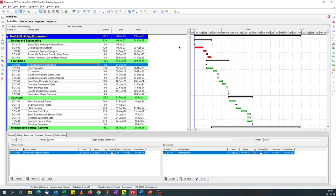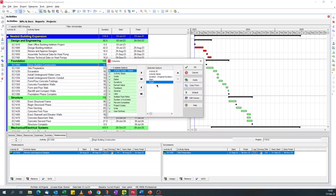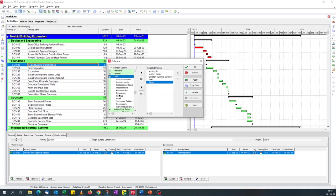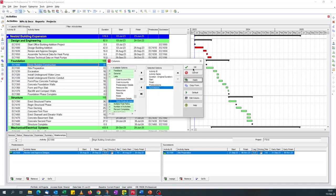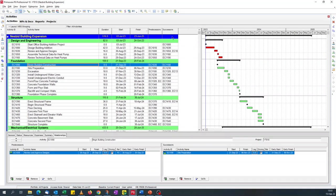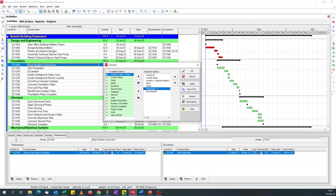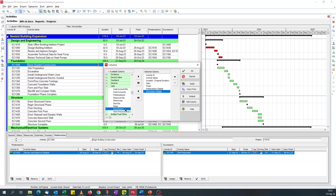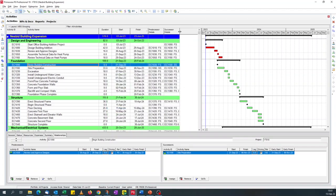Let's get down to it. Assuming you've got this schedule — it's just one of the default sample schedules that come with Primavera P6; I've changed the start date to 2023 just to make it relevant. Let's add the predecessor and successor columns. If I go to the list and add predecessor, successor — these two fields don't have relationship details defined, but remember there are also predecessor details and successor details fields.